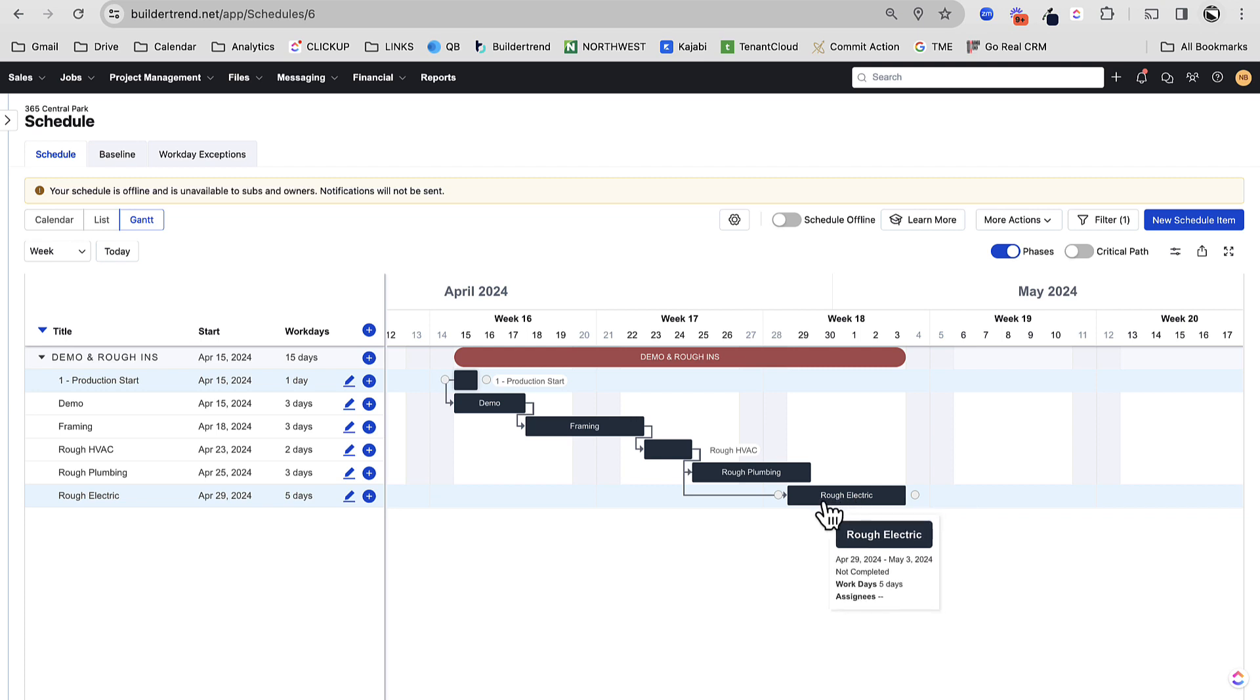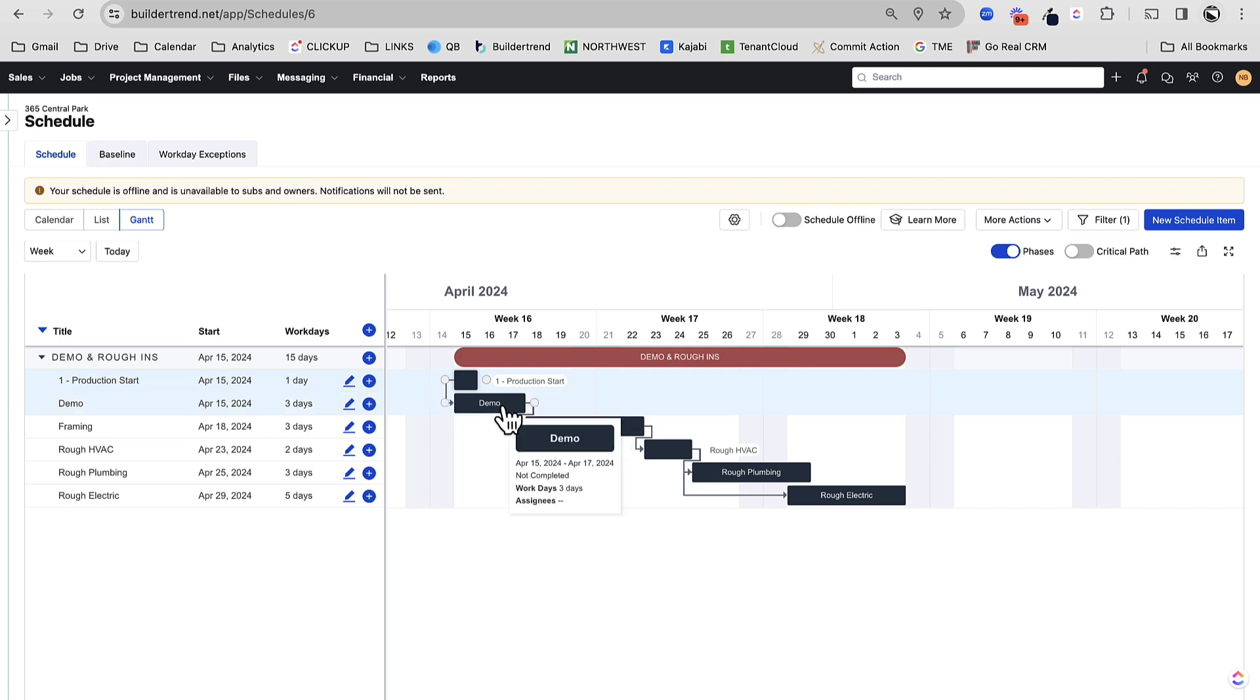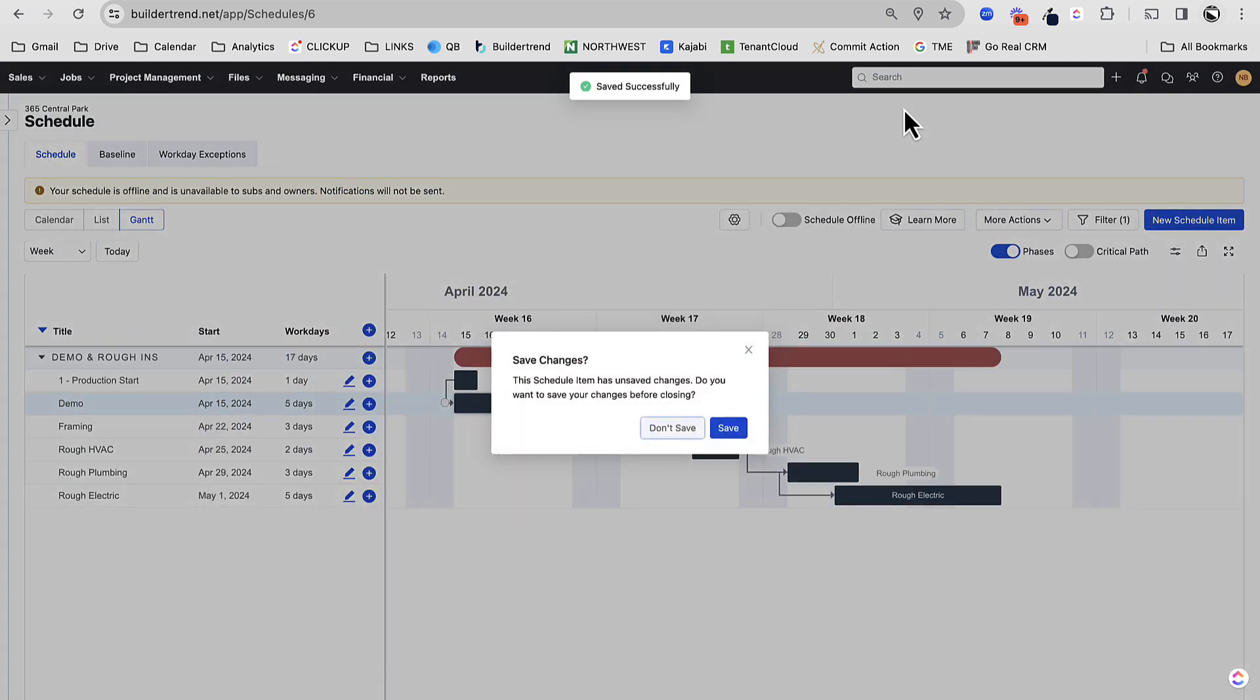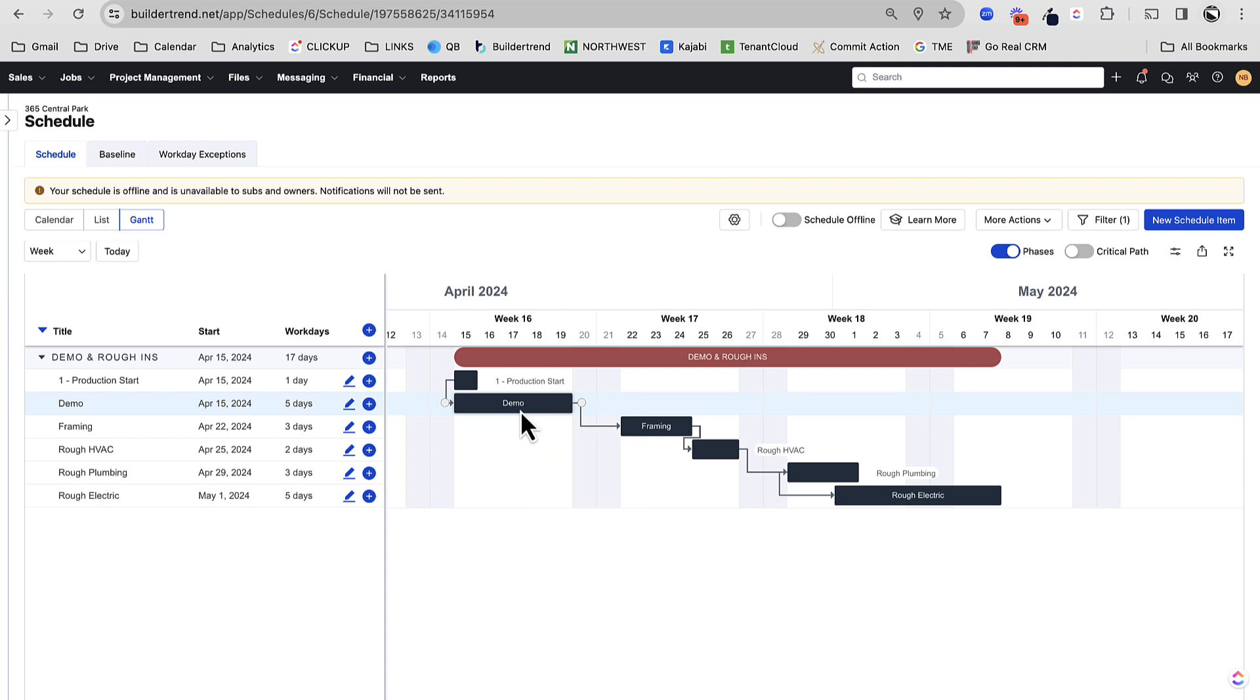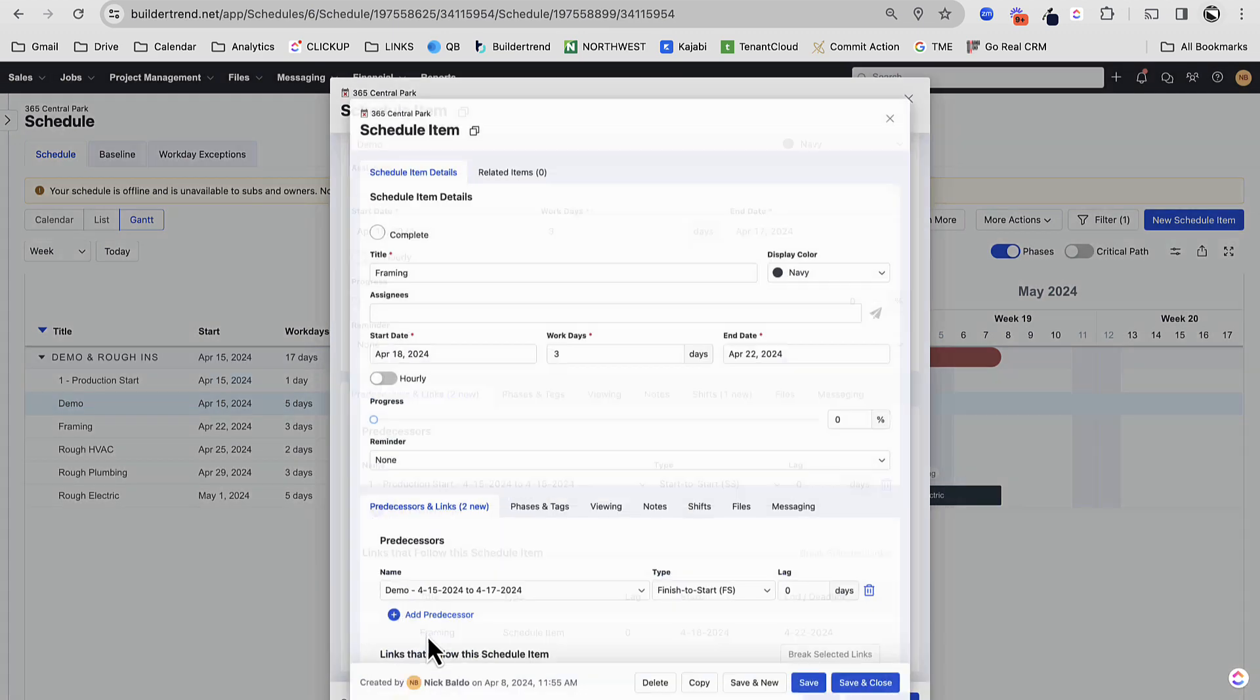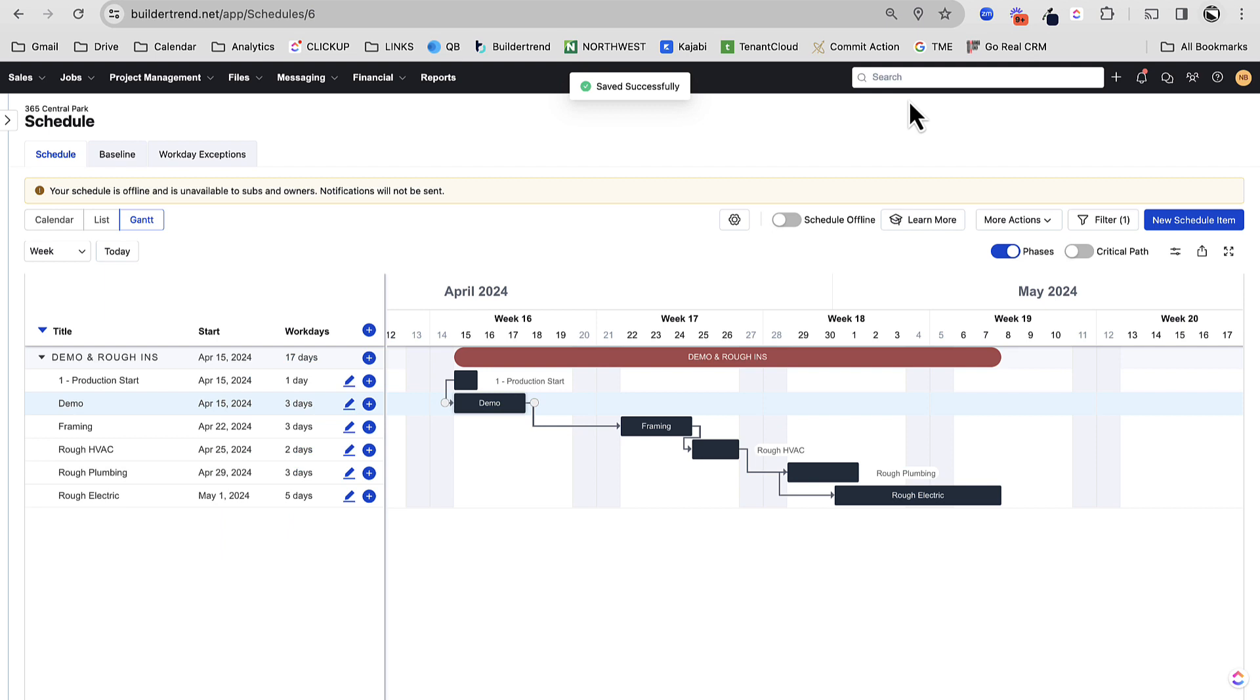Now I mentioned adding a lot of slack in here. I definitely encourage you to do that. You can add slack in a couple of ways. One is on the duration of the tasks or two is on the dependencies. I kind of go back and forth on how this works. Lately, I've been doing it more on the duration of the tasks. So demo, maybe we think it's going to take three days, but then there's some cleanup and then we got to get our framing crew in there. So maybe we just say it's going to take the whole week. I found that that's a little bit more helpful than trying to jam it all in. And you can see how it moves everything out then. Another way you could have done that is you could say demo is going to take three days. But then my framing, here's the link down here. It's going to be finished to start plus a lag of two days. And it's going to accomplish pretty much the same thing of building in that slack there.